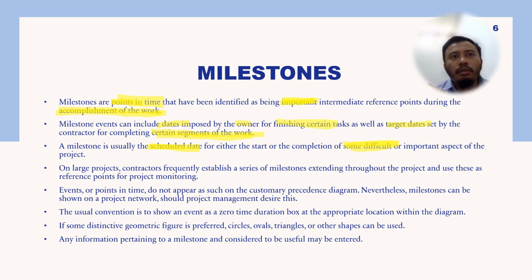You need to apply for a permit. You need to assemble your traffic management plan and traffic management layout, and a traffic management officer needs to be there. So it is very difficult and highly technical, and involves a lot of parameters and a lot of stakeholders. So that marks a milestone worth being marked as a milestone. And sometimes the milestone marks an important aspect of the project.